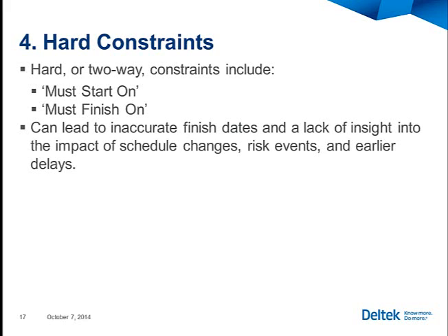Now, I understand management challenge and maybe even challenging the team to results that they haven't previously accomplished, but that needs to be done sparingly and it needs to be done realistically. Every time I see a hard constraint, I challenge it. I'm willing to leave it in, but there needs to be a good answer. It can't just be, well, that's when we need to finish. Yes, but does your plan support that type of finish? That's a tougher question to answer, and it needs to be answered when those constraints are used.